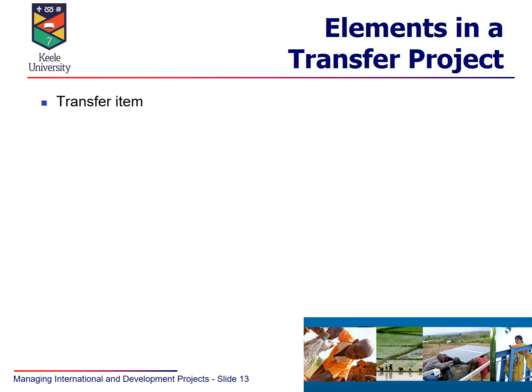So it might seem fairly obvious, but we do need to clearly define what it is that's being transferred, what knowledge, know-how and technology is in the project, and what's actually outside of it, so that people are very clear on what needs to be transferred.